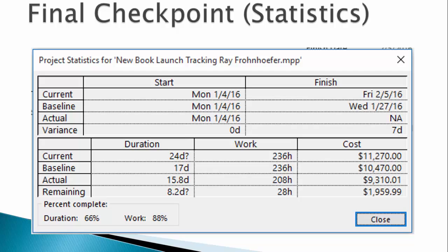Your current budget should be exactly $800 greater than the baseline budget. Since you are within 10% of the estimated budget, you and your team did a great job at estimating. The surprises on the journey of this project were small and don't require corrective action.